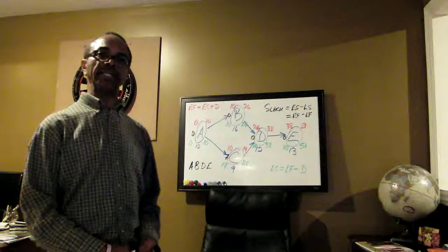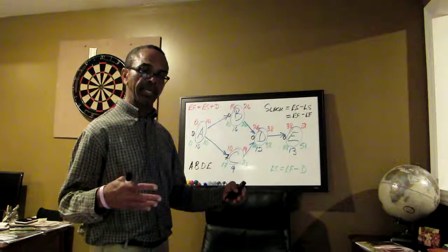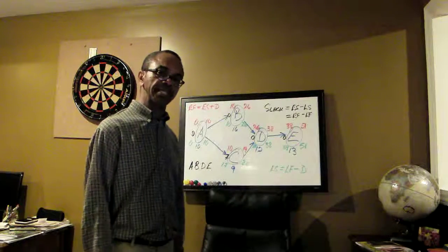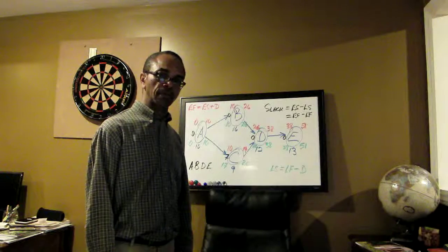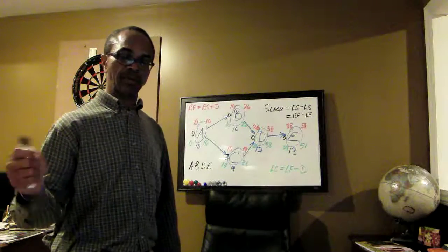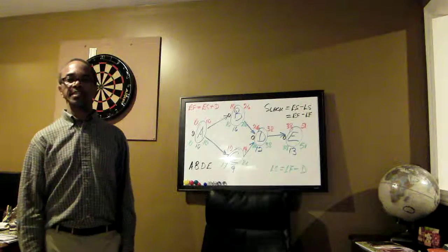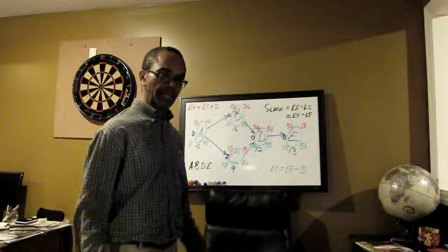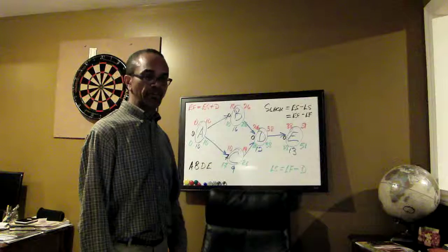And what is it that we tend to do? Coming back from our network diagram, what is it that gives us the most latitude, the most flexibility to apply smoothing? Anybody else? Yes, you got it. We look for activities in our project that have slack, and we work on those because that's where we have some flexibility. So that's what we do in resource smoothing.